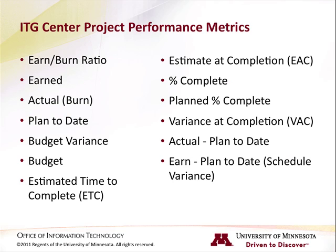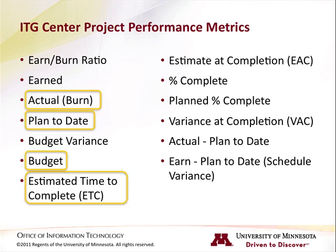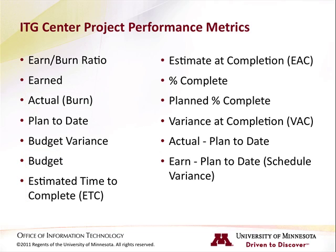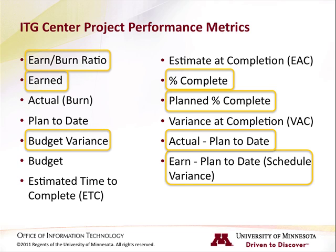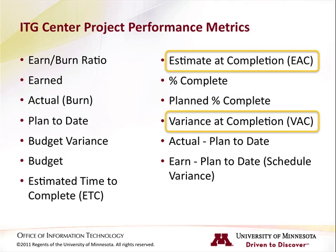We learned that there are four core metrics that are pulled directly from data in ITG Center: Actual, Plan to Date, Budget, and Estimated Time to Complete. The remaining nine metrics are calculated from these core metrics. Seven of these metrics provide additional information about the current state of a project, and two forecast the future state of the project at its conclusion.